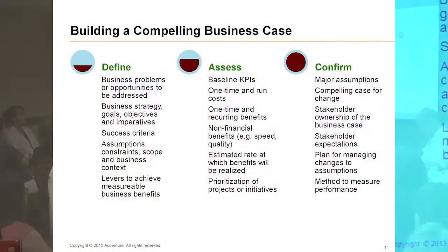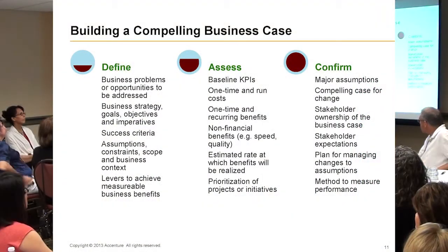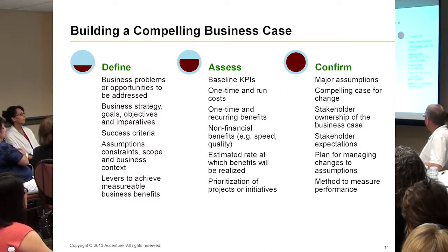Things are typically done in fiscal years, but if you look at it a bit more granular, at a quarter level, it can sometimes be helpful to plan at that quarter level to really see how that ramp works. As you assess that, once you come up with this, in the private sector you'd call it return on investment, right? But there's an earned analysis worksheet, is that what it is, that shows what that ramp is and what your payback period is?